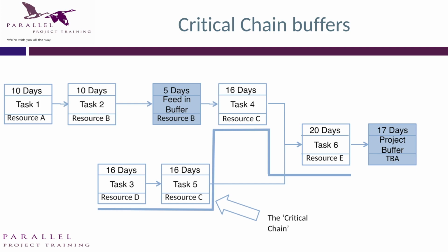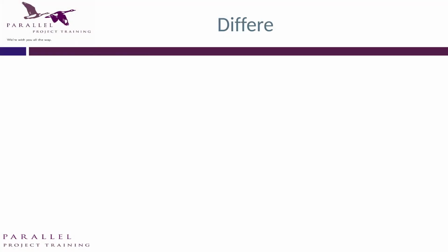So that's critical chain. It's quite useful for R&D type projects, which are very resource intensive, where you're using expert knowledge really, and where resources are the driver of the constraint. Where resources are more flexible, where you can hire additional resources in, sort of traditional trades, then critical chain is less useful. So it's in those highly resource constrained product development or R&D type projects, or maybe IT projects where you've got very limited ability to bring specialist resources in.